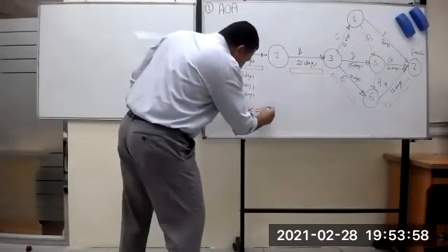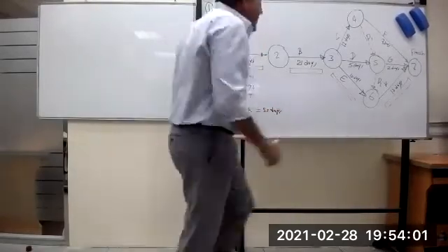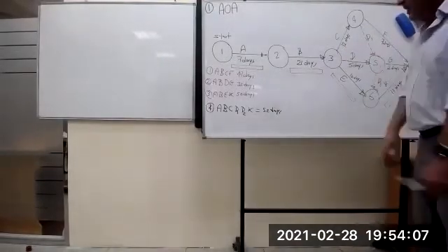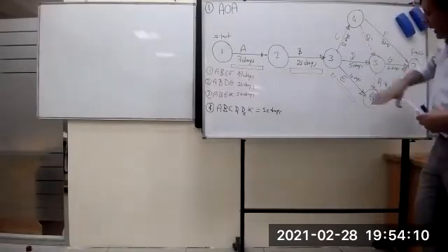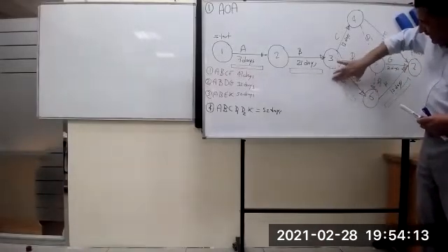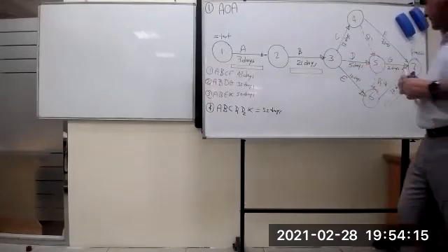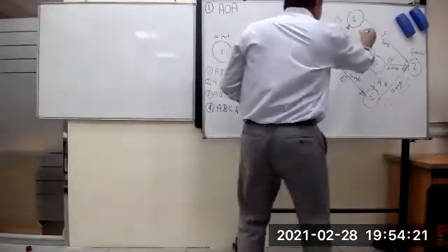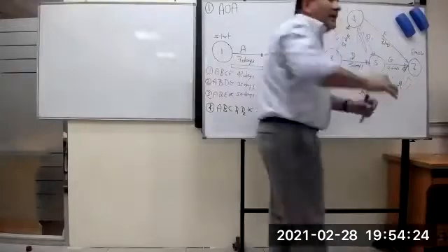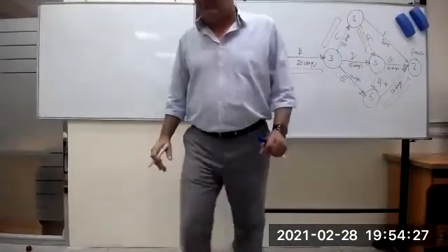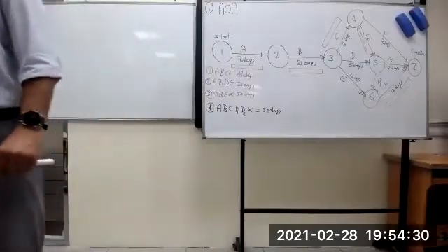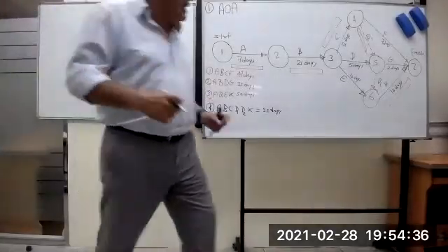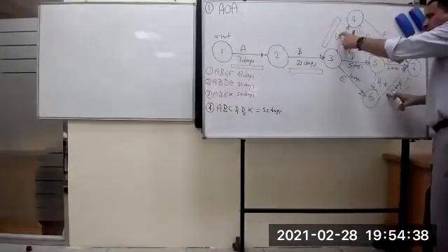This is 52 days. I made it 52 days because I changed this activity to 12. You remember? Now this activity is not critical. See? This activity has now become critical. Your critical path goes this way and in this direction. This activity does not exist. The relation does not exist. Dummy. But what does dummy mean? This activity cannot start until C finishes.